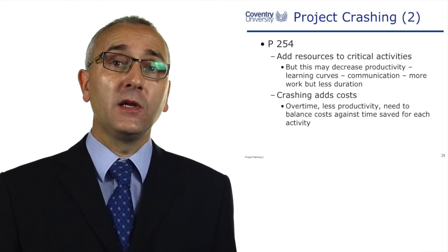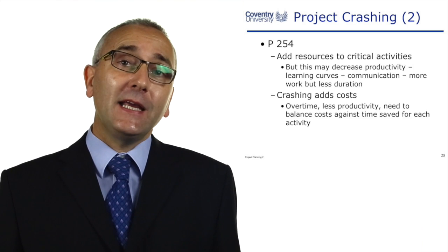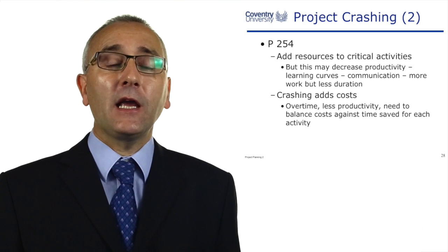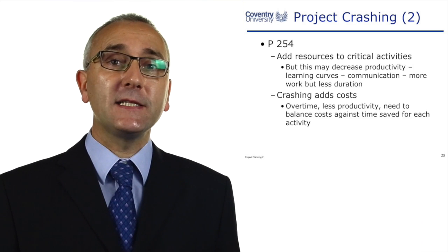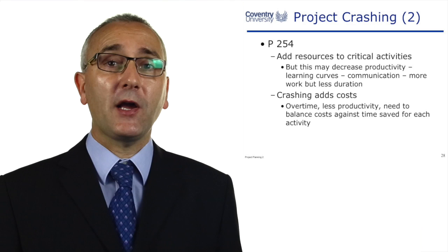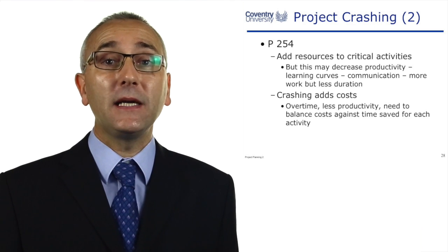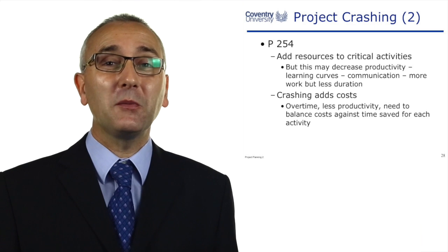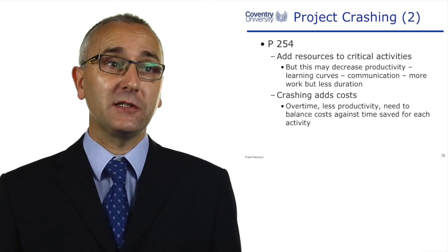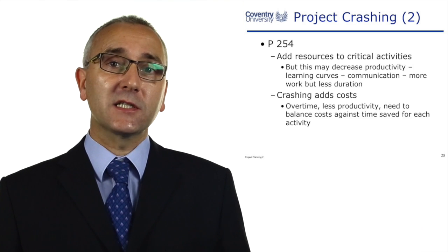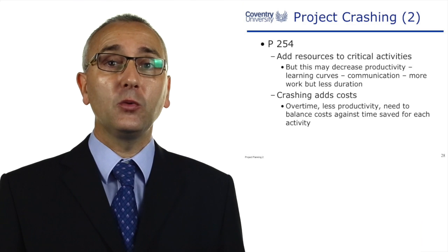Working overtime to get more work done in any given day can lead to less productivity. Another example: we're painting a room. You put two painters in there and the duration should be half. You put three painters in there and the third painter is going to make the tea for the other two. You're not going to make any more savings — it's less productive. So we need to balance the cost of our crashing method against the time that we've saved.